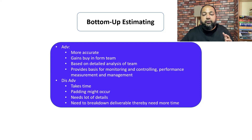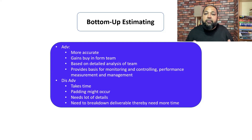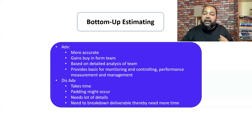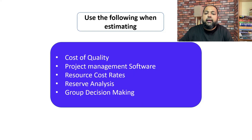Bottom-up estimating is the most accurate — it's the best way of estimating. Team members get buy-in because they're involved in breaking down activities and providing estimates, making it a team-building activity. It provides a solid basis for monitoring, controlling, and performance measurement. Disadvantages: it takes a longer time, padding may occur, and it needs a lot of detail and breakdown of work items — requiring more time. However, the accuracy is very good.